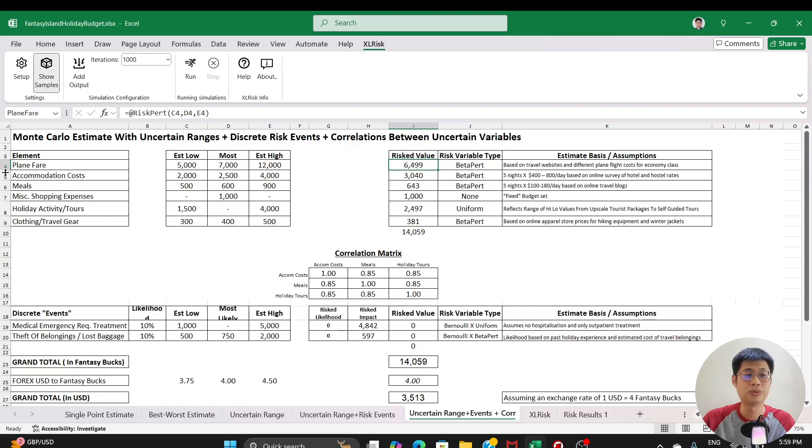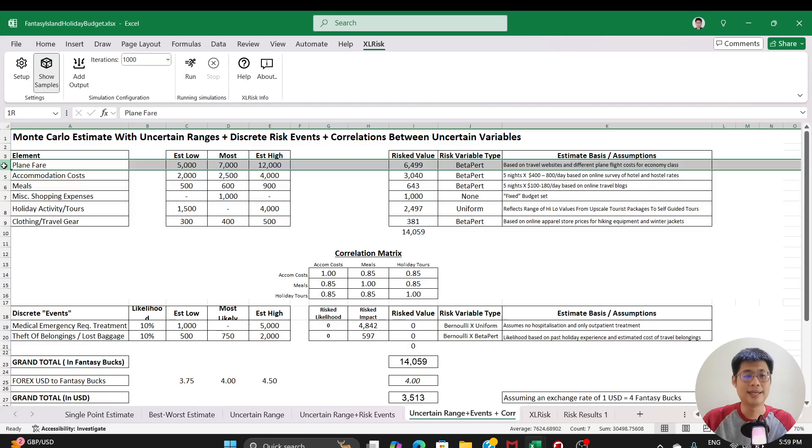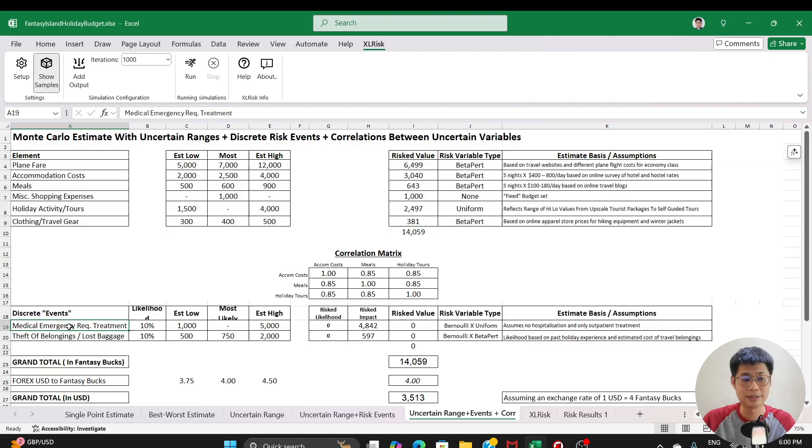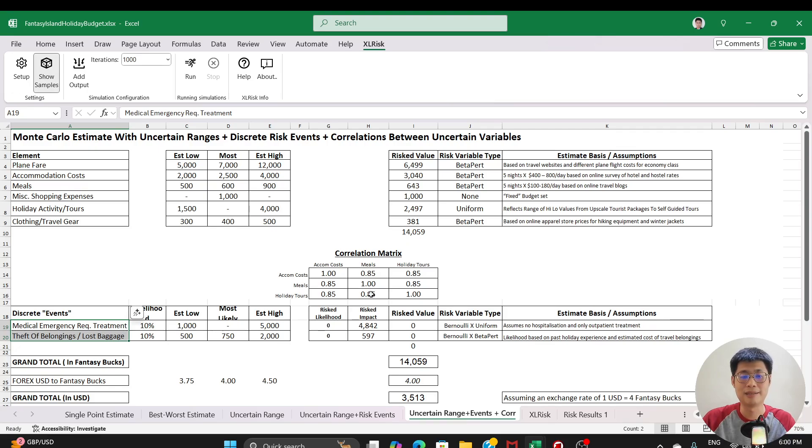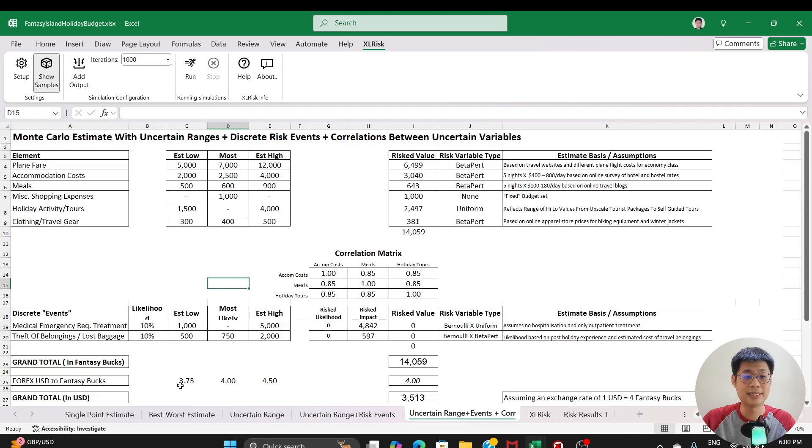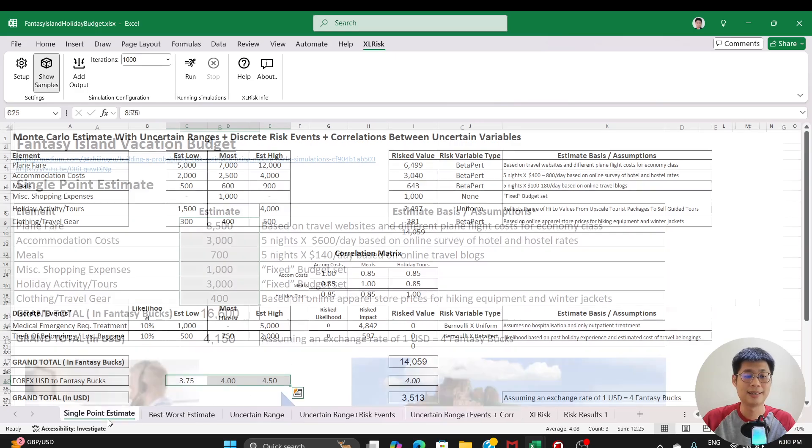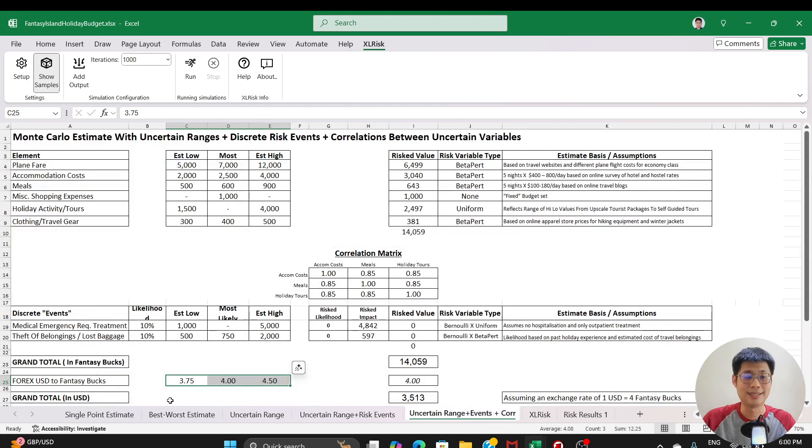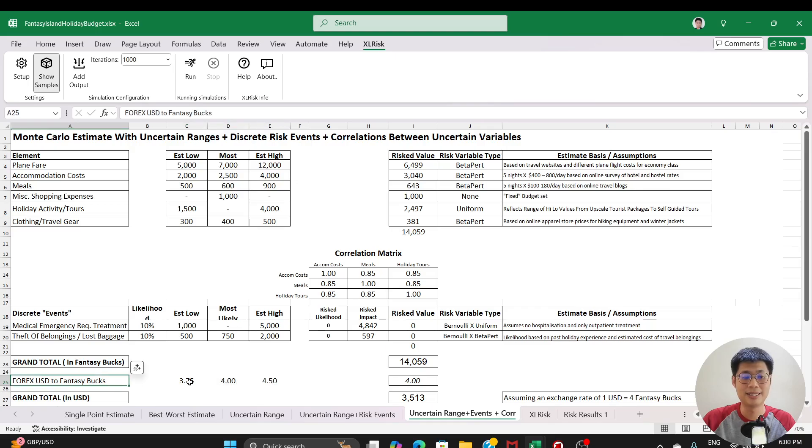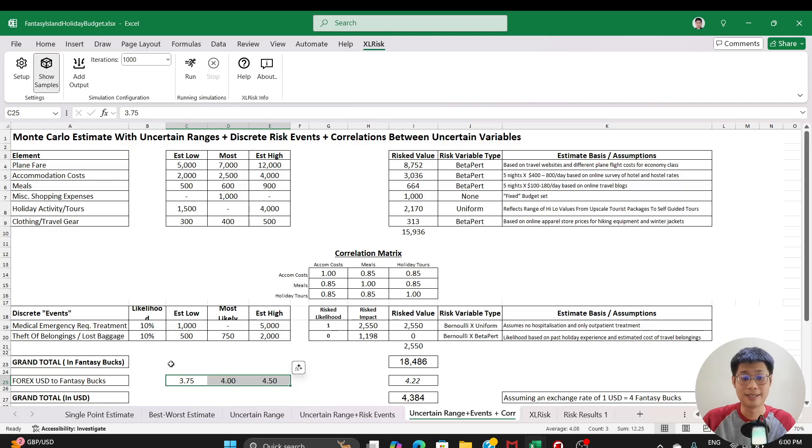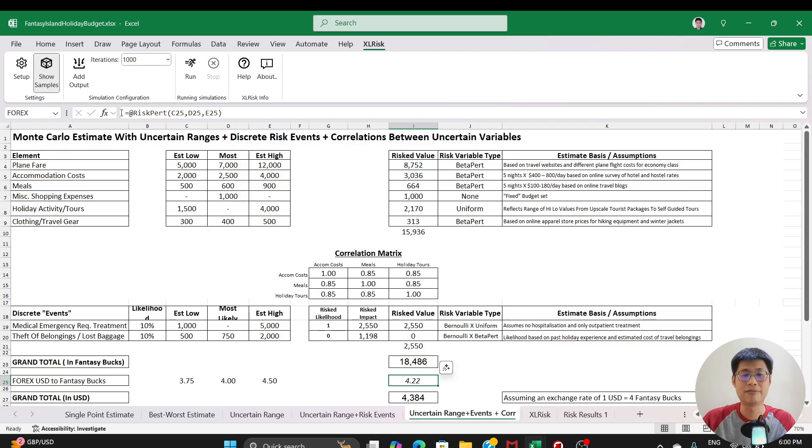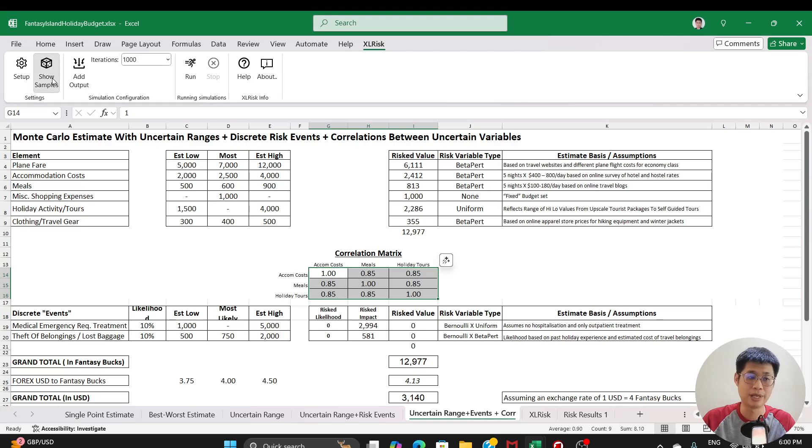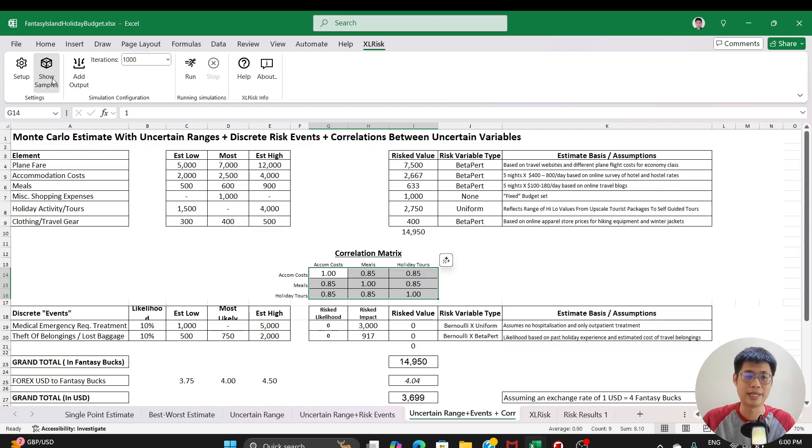Now, in addition to the elements that you know you need to add up, sometimes there may also be events that may or may not occur. So, you know, risk events that have a likelihood, they have an impact and both of these are also probabilistic in nature. You may also have things that are kind of multipliers. So in the example I just showed, this is a budget estimate in one currency, but when you convert it to another currency, the currency exchange itself has variability where it can take a high to a low number. So you get kind of an amplifier effect on all the numbers that you saw before. And in addition, you also have correlation between the variables because some of the variables have to kind of move in the same direction. So even though they are random, they have a common direction that if all of them tend to be high, they will all be high or vice versa.